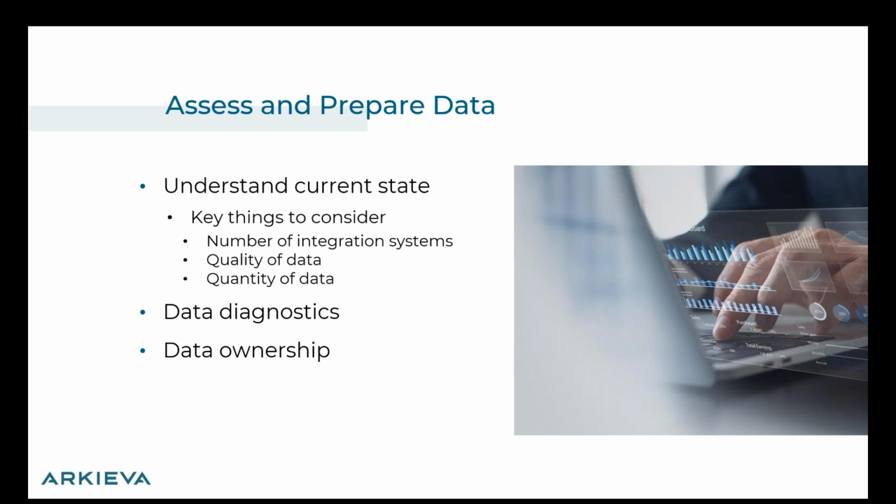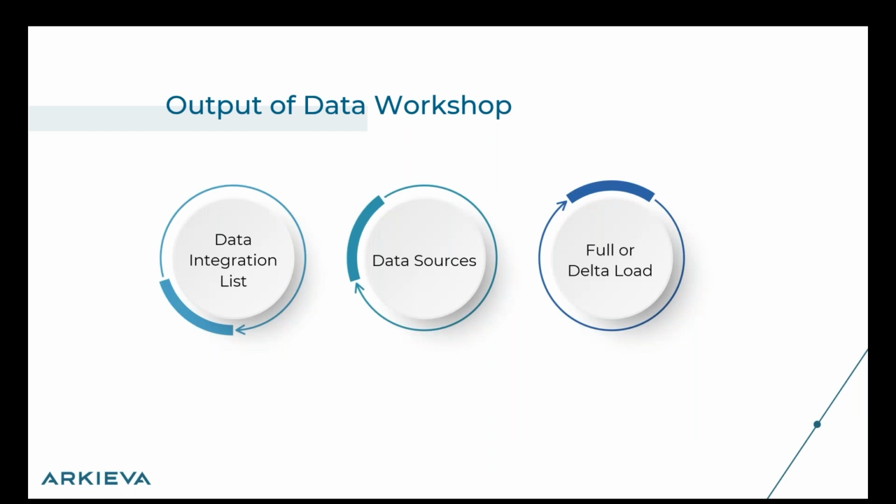Then data diagnostics. Are we going to leave it for the users to find the errors in this data, or are we going to help them and surface the issues in the data? And then last but not the least, who owns this data? Who is going to give us this data or connection to the data source so that we can pull it out? So a lot of these things go into this data workshop, and the output of the data workshop should very clearly list the systems to which we will integrate, as well as what we will pull out of those systems, or in some cases push back into.